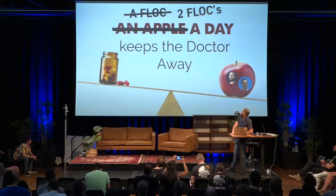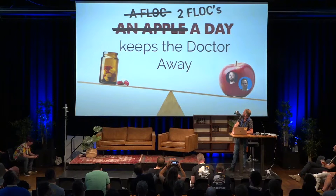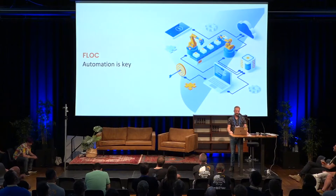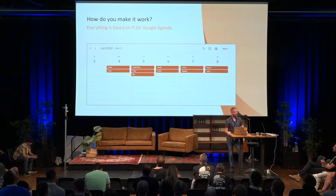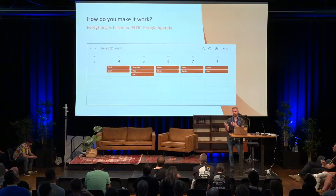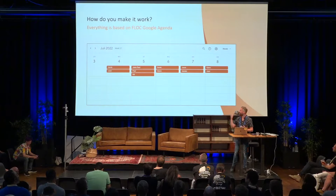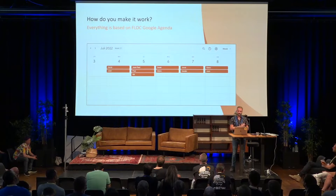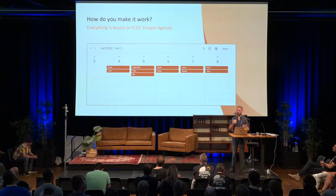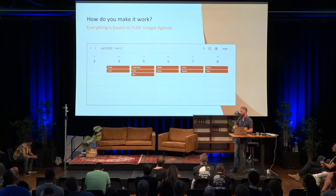Customer-related Flock activities are financed by our SLAs — the service-level agreements we have with our customers. Automation is really key here, and rule number one is: keep it very simple. During our sprint planning, we plan the Flock for the coming sprint with the whole team. As you can see on the slide, we use Google Calendar for this, and this calendar is the input for all other automations. Every communication tool we use connects to that agenda via the Google Calendar API.